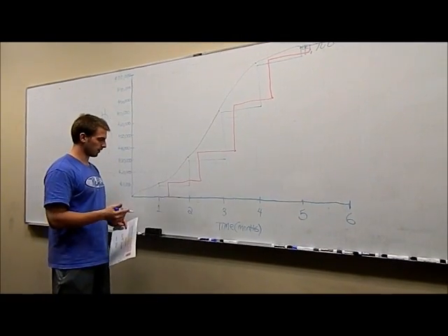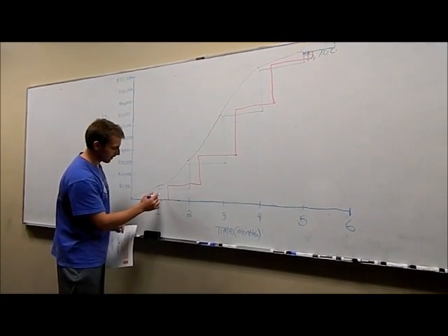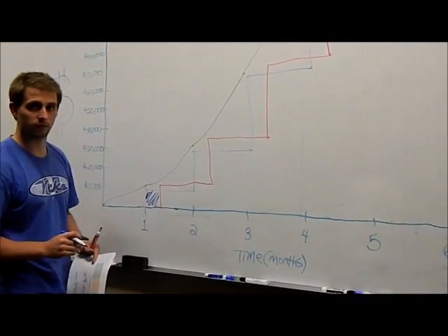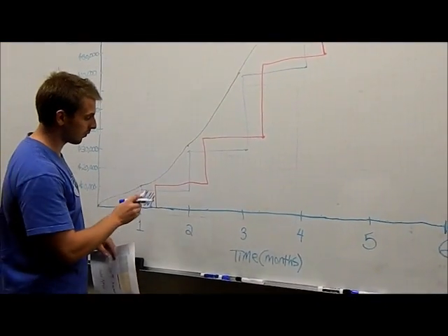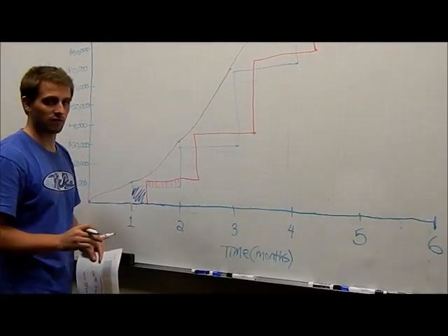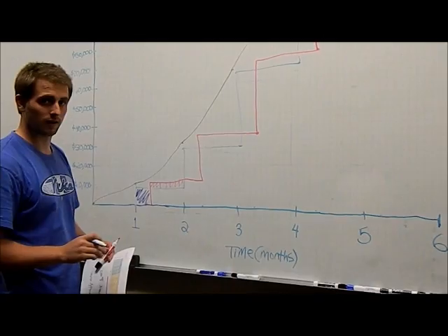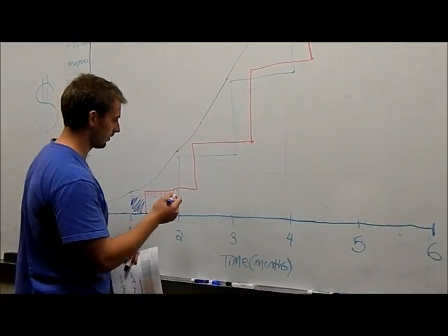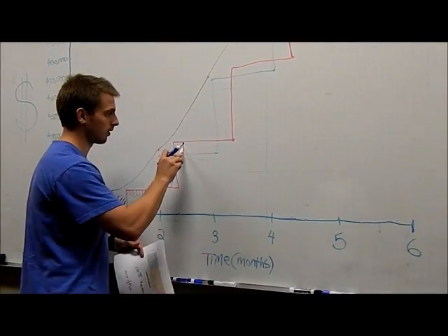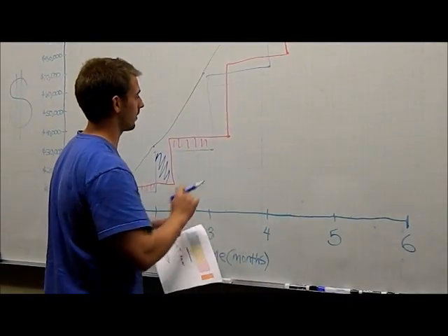Now, as you look at this curve, you'll see this area represented here represents the cash surplus. We have not paid our subs yet. We have positive dollars in the bank. Once we pay our subs, we're at a cash deficit. That's where you have to take out against your line of credit or finance. So this repeats itself all the way through the job cycle.